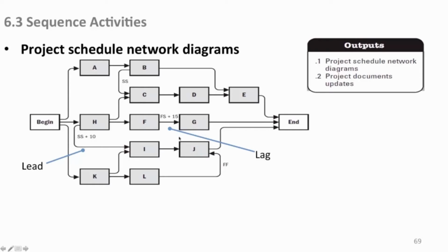And then you would need to talk about your scheduling method later on, which would be, you know, how long finally does it take from the beginning to the end? If it's too long, can we compress that? There are ways of doing that. Moving E to be done concurrent with D may shorten some time. Maybe we can reduce the time it takes to do F. There are techniques you can use if you can on your project to adjust the end date.